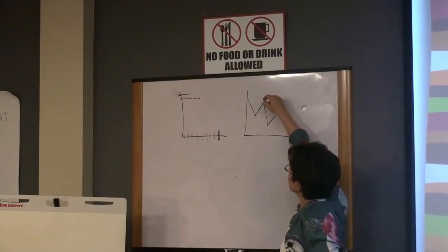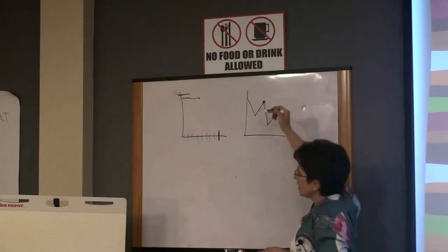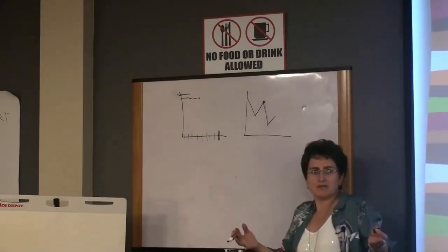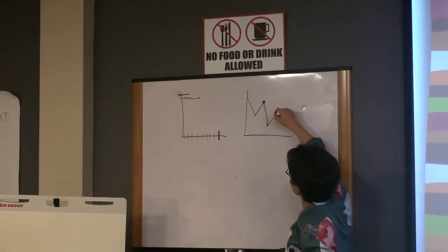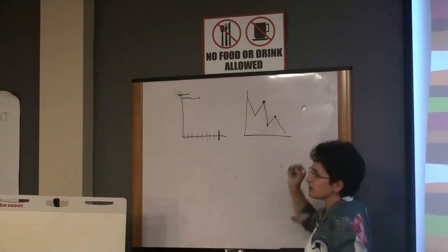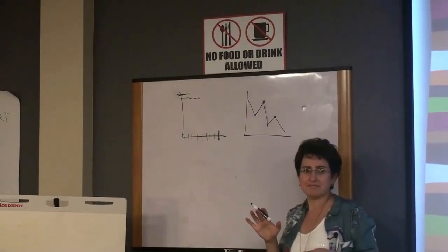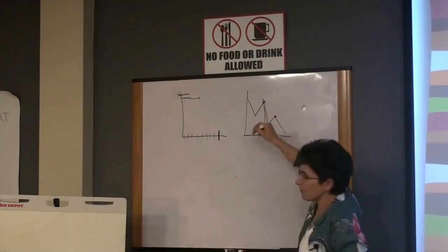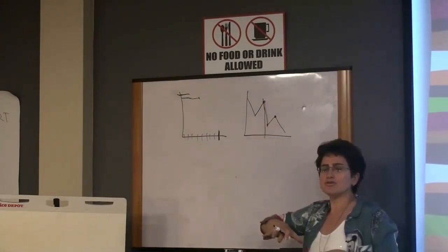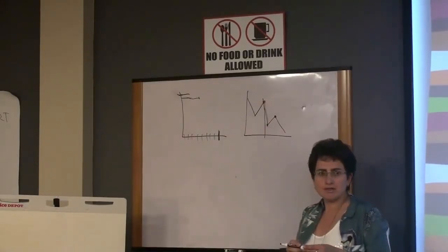So which means, again, the work units went up, and then again down, and then we again realized, oops, we misdeveloped again, right? Something doesn't work properly, so it went back to the bucket. But as long as at the end you can arrive to your sprint completion, you are still okay. That's why it is very important, at this moment of time when you have a checkup with the team, to analyze and understand why this is happening and whether or not we have the capacity to accommodate the changes that we are making, right?